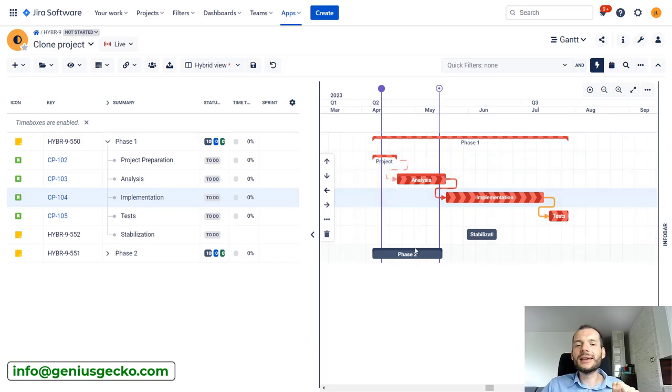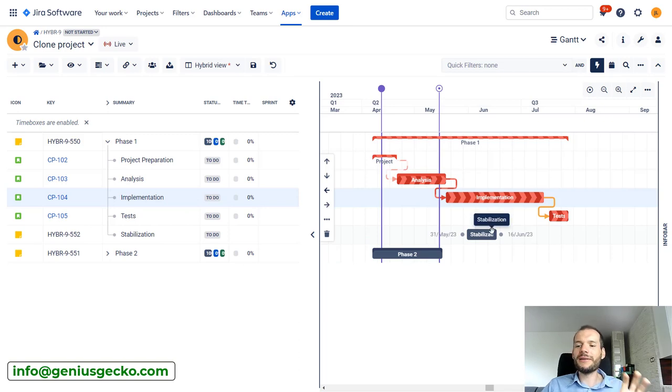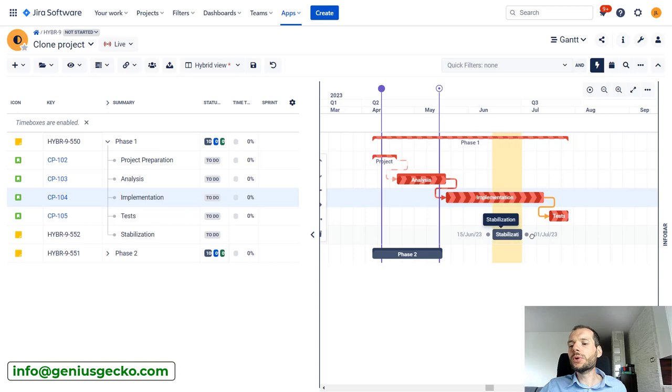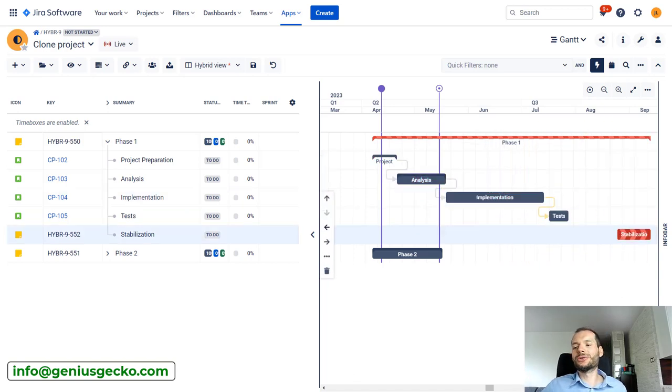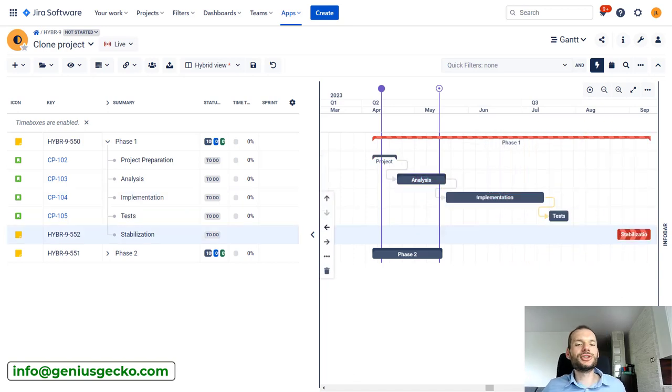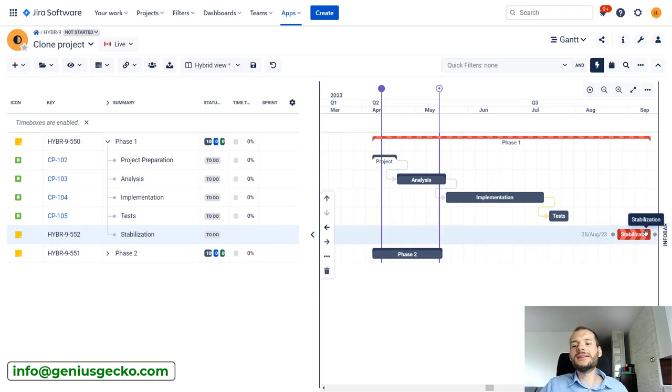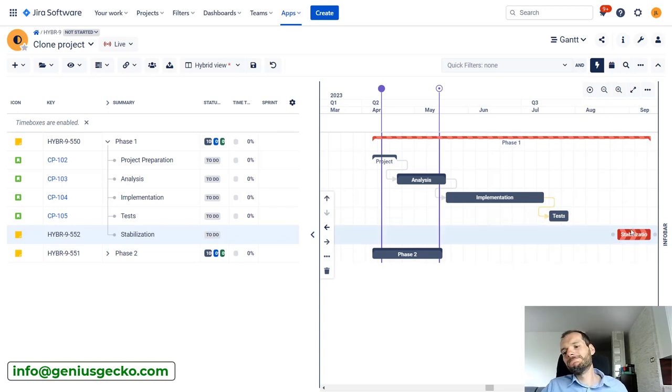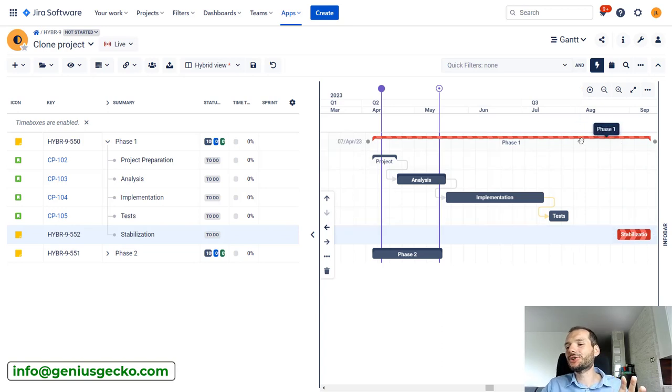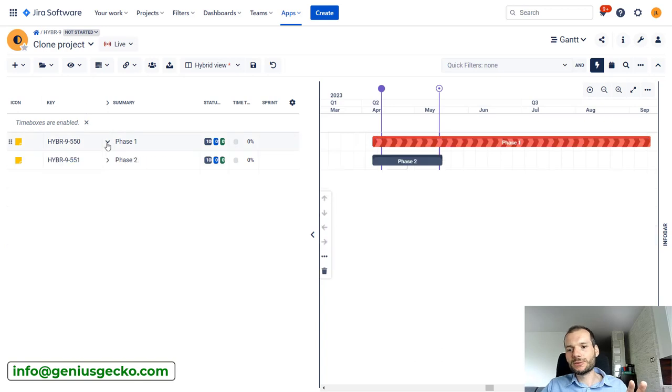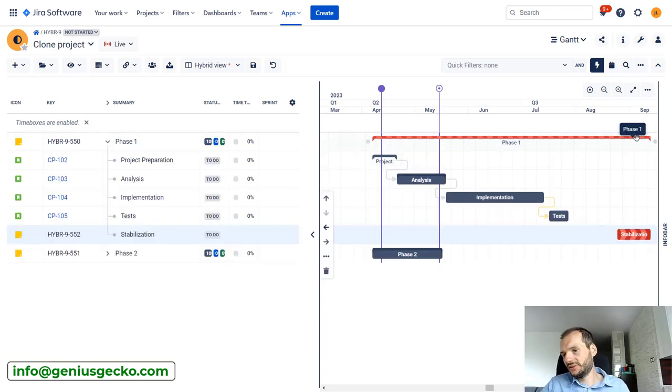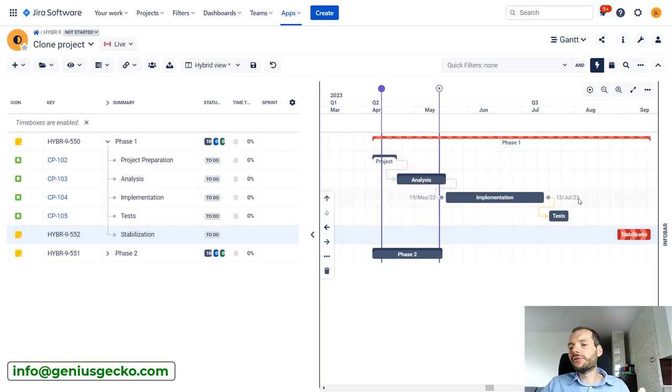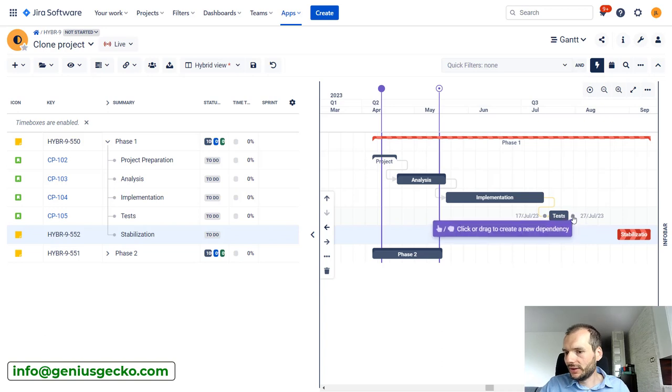It might seem like the critical path is not working. Second use case is if we have one task that is really finished later than everything else. So if I move this one, Stabilization, so that it ends later than Tests, only Stabilization will be on critical path—or actually Stabilization and the parent task. So in this case Phase One. You can see that Phase is also on critical path because their end dates are the same, but nothing else really.